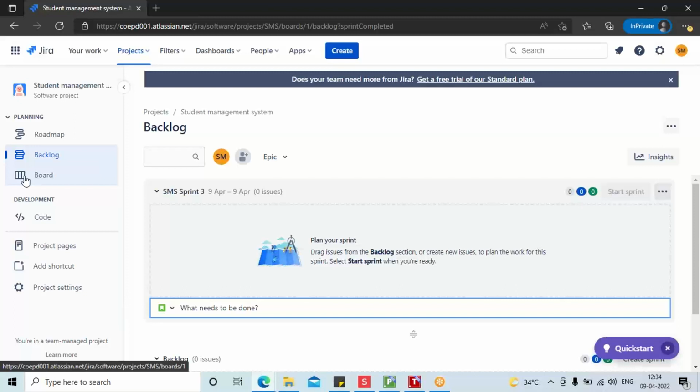Hi, I have one question regarding that story point estimate. You mentioned it is in hours, so you entered that 4. Does it mean it stands for 4 hours? Yes. And if it is more than a day task, if we take a day as 8 hours, then 16 hours means 2 days. Okay.